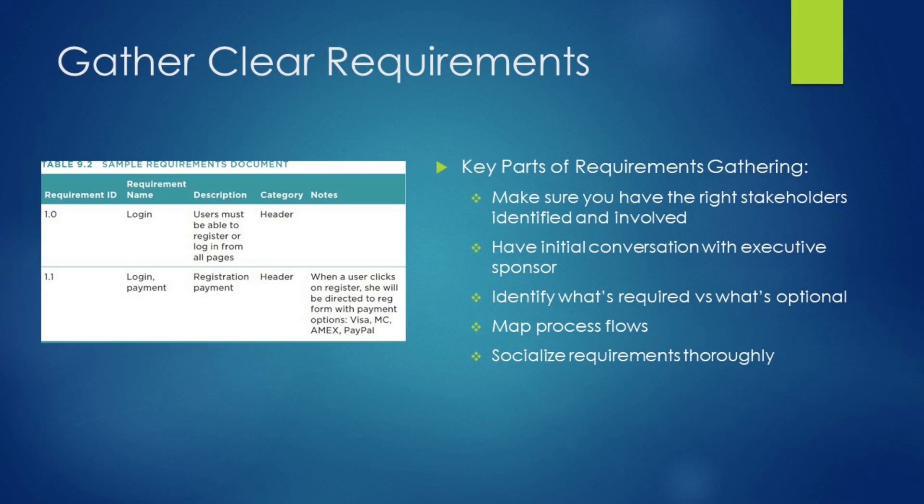Number 1: Gather clear requirements. The first part of good requirements gathering is making sure you have all of the right stakeholders identified and plugged into the project from the beginning. After you're confident you have the right stakeholders involved, a good way to start gathering requirements is to have an initial conversation with the project's executive sponsor to get her thoughts around what the requirements are and let her guide you around who to talk with next.